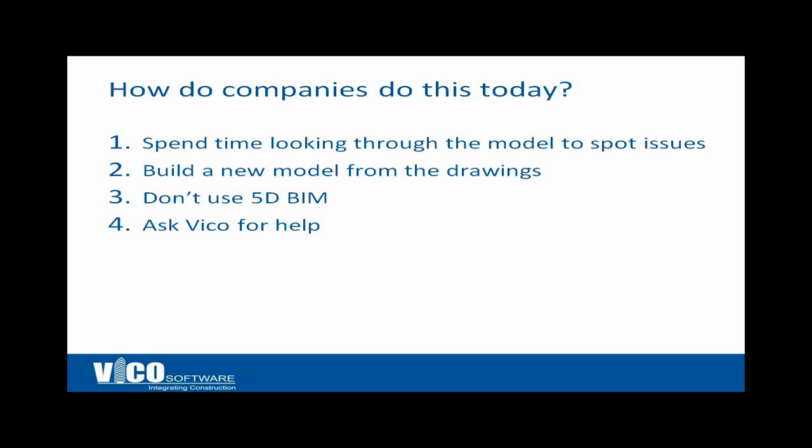You could also build a new model from the drawings, and for complex projects such as hospitals, that's done frequently because it's just so important to use the contract docs to get the model, because that takes away almost all of the ambiguity. So that's a very powerful process, and it's done frequently. But of course, none of us want to do that. Who wants to build a model again if we don't have to?